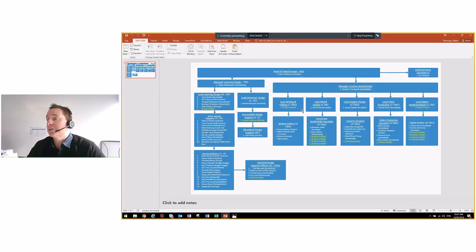They've also just started. They are based in Strathfield, down in Sydney. One of our big challenges there is that we have a devoted facility space in Building C down there in Strathfield, but it's way out of date. It's like a decade out of date, and we need to refurbish that space. We also need to procure equipment. So that's one of the big challenges that we've got in our team at the moment, to get that video capability established quickly, because we already have a lot of video content requests.